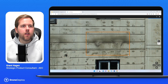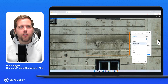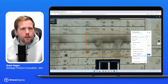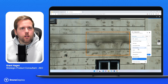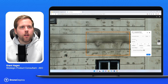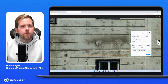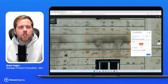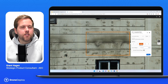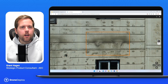I'm going to grab the issues tab and select the issue area I want to note. I'll change the observation type — you can see some of the options available. I'm going to label this as incomplete work. It doesn't look like it's fully done — it needs to be ground or smoothed out. I'll give a quick summary: 'Grind out the excess concrete.' Severity level is a three, and let's put a cost of a thousand dollars on it. Procore users — if you want to connect this to a Procore project, that's obviously an option as well. I'll go ahead and hit done.